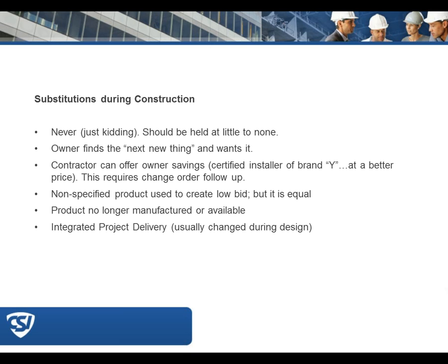Well, let's look at the next slide, Matthew, and talk about when substitutions are not okay to be considered. And we've touched a little bit on this. There was one more comment here. Kevin wholeheartedly agreed with both you and Doug with it being necessary for the document substitution approval after contract extension by a change order. But then there was a question here about products may be equal, but warranty and maintenance and replacement costs may not be equal. This is especially the case of green buildings. Substitute products may not achieve LEED requirements, causing LEED consultants to look for other credits elsewhere. The majority of our firm's clients do not accept substitutions in those areas.